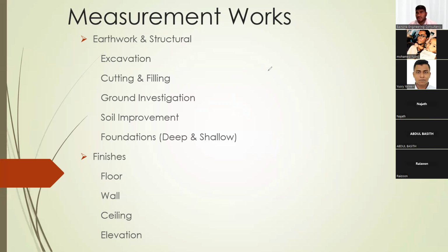So this quotation he brought or you brought him is like 35 dirham. So there will be an adjustment on the rate. Then there will be a saving to the client, because he put 40, then they installed at 35. Yes, that is adjustment. There will be a saving to the client. At the same time, that 40 may go up to 50. So if it is 50, this is a variation to the contractor, of course. You can ask for that 10 dirham as a variation in addition to the contract. That is what we call a prime cost rate adjustment.